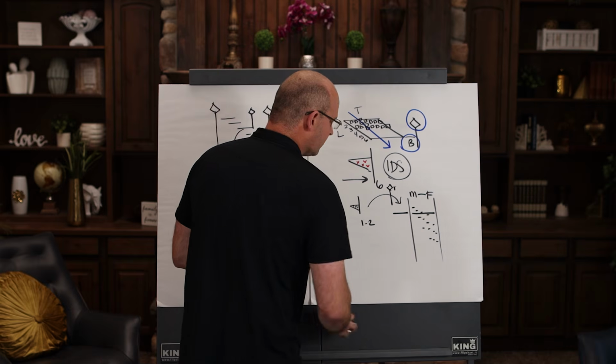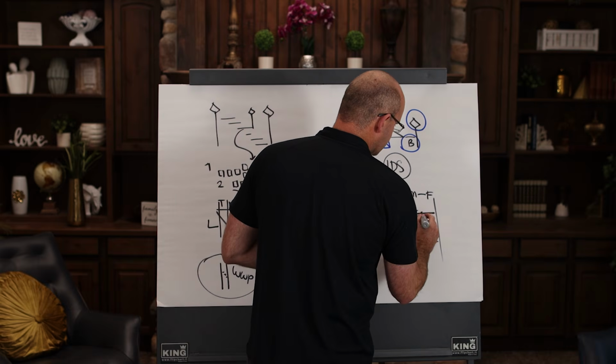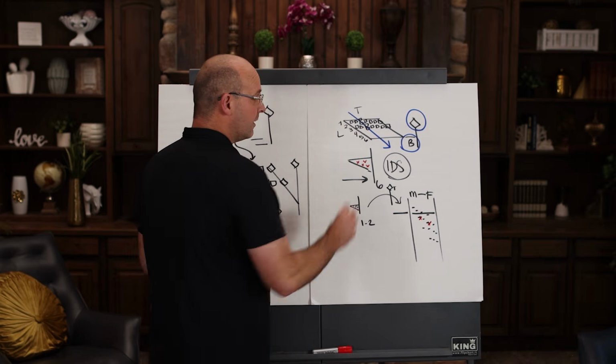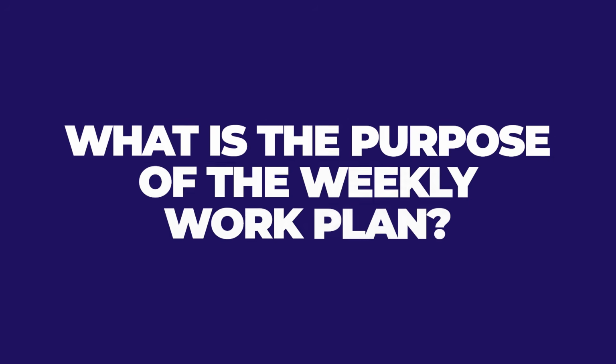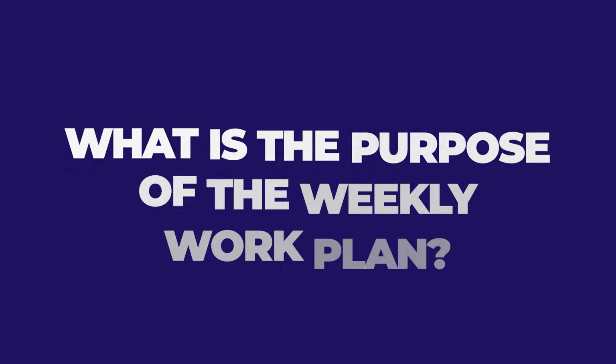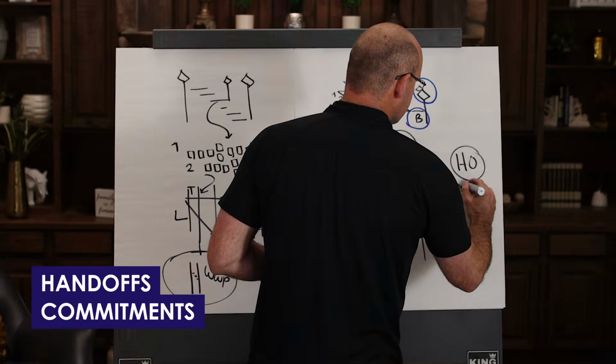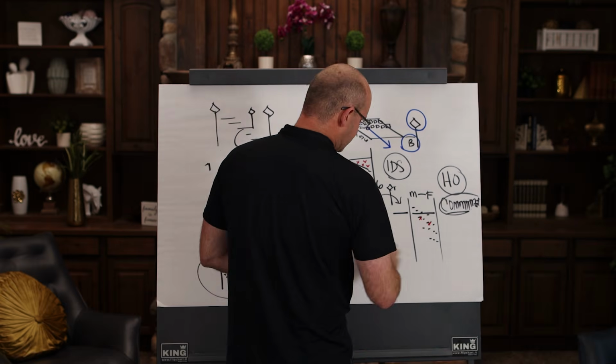Now, will you still be looking for problems inside the weekly work plan? Yes, but if we've done a really, really good job, most of that will be done in the look ahead plan. So what is the purpose of the weekly work plan? The purpose of the weekly work plan is our handoffs and commitment. Commitment means that these activities are being committed to.